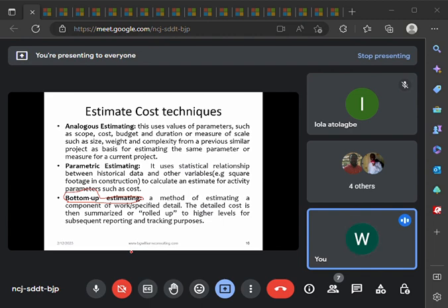So with all these different costings for each of these different activities, if you sum them up together, it will form the cost for a work package. And all the costs for the different work packages summed together form the cost of the project that needs to be completed. So that is why we call it the bottom-up estimation. So starting your cost estimation from the bottom to the top, arriving at the total cost of the project.